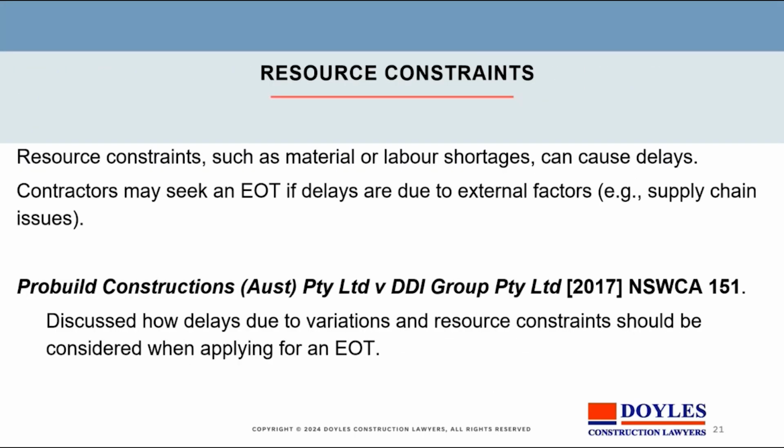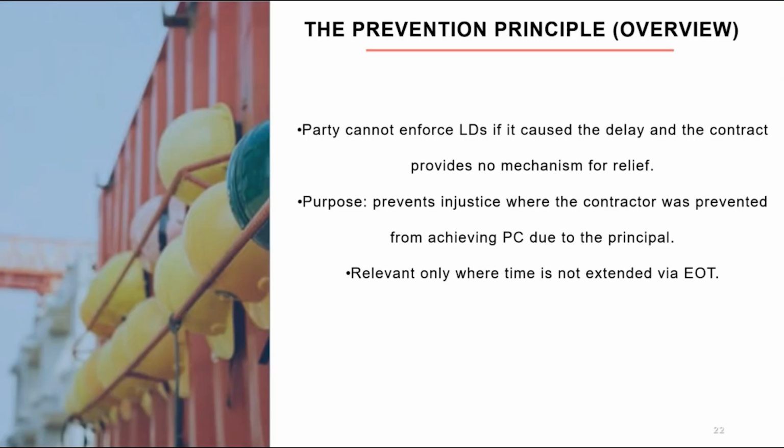So the situation then is that if we look to the prevention principle, it applies not only in extensions of time claims, but in contract rather more generally. And it says that a party can't enforce liquidated damages if it causes delay and the contract provides no mechanism for relief.